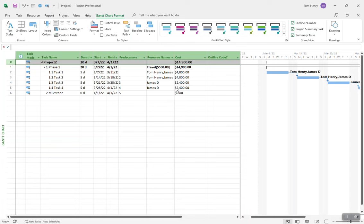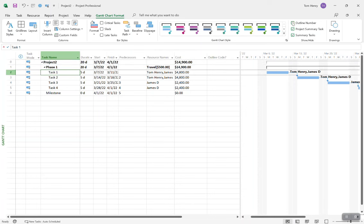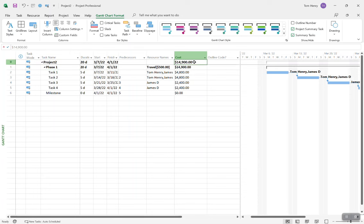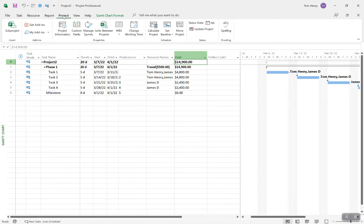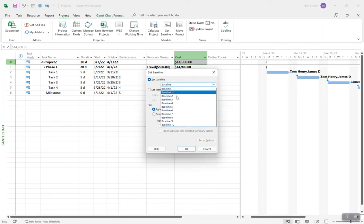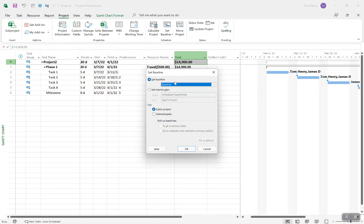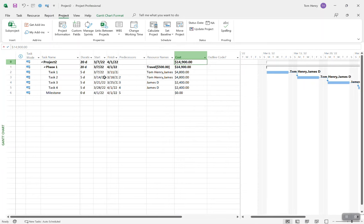Let's take a look at our project overall. Our tasks are linked, resources are assigned, we know our fixed costs — we're ready to start the project. Before you start, you're going to want to set the baseline. You have access to set up to 11 baselines, but the only one that counts is Baseline — baseline zero. You can do that for the entire project or select specific tasks. I recommend doing the entire project. Setting the baseline is the go-between between planning and executing your project.